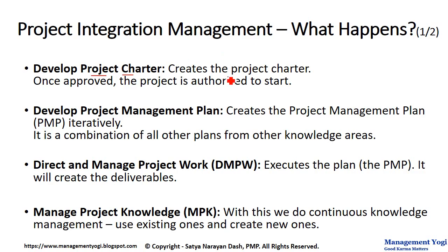This process creates the project charter, and this is a key project document. This charter document names the project manager and authorizes the project manager to start the project. Also, this project document authorizes the project manager to apply organizational resources to the activities of the project. We take this project charter and move to the next process of develop project management plan.